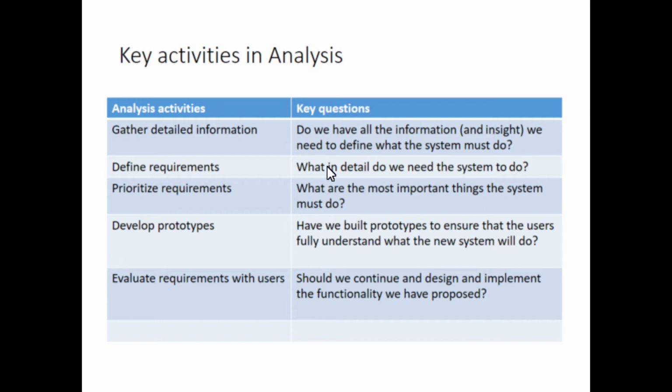So here you will define requirements in terms of functional requirements and non-functional requirements, and then after that you will prioritize requirements. Here we have seen that requirements can be of two types, mandatory versus optional. So you will prioritize the mandatory requirements at first to be performed in the early phases, and then the optional ones to be performed later based on your resources. So the other one is developing prototypes.